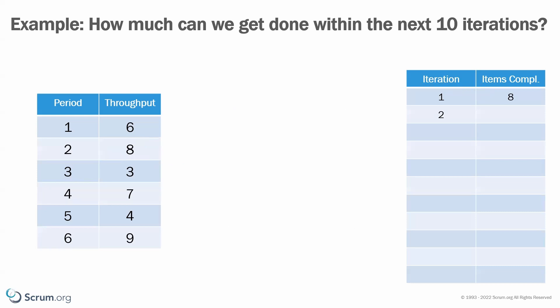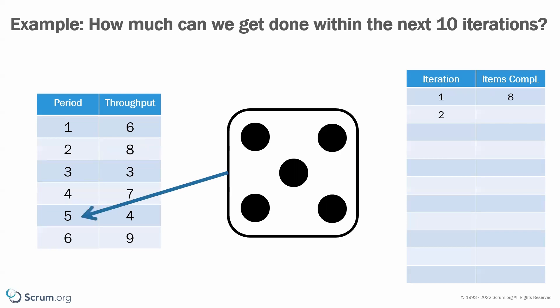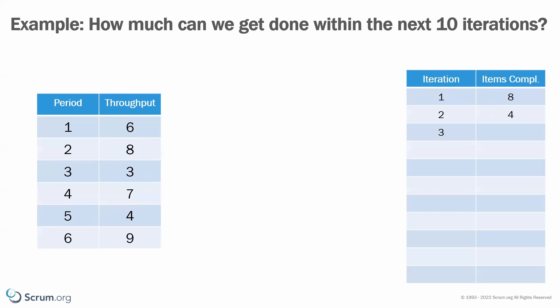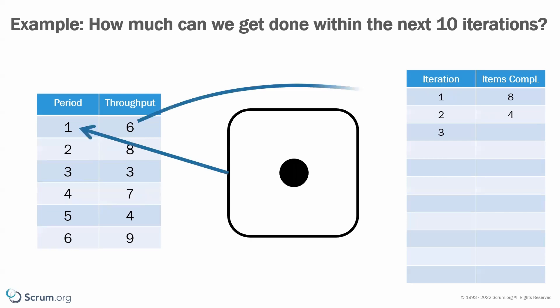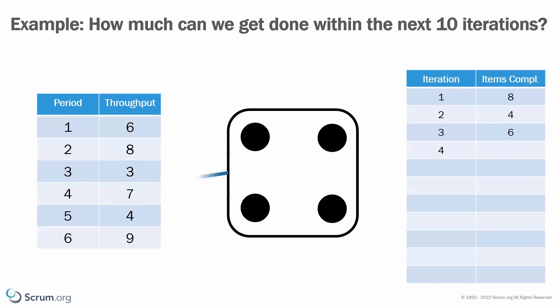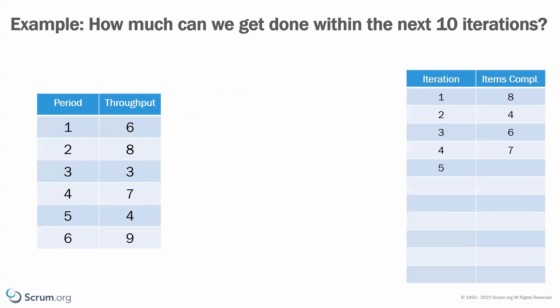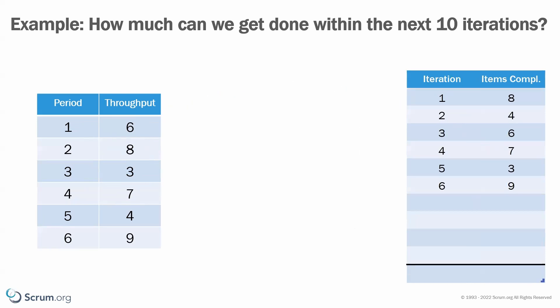Then we repeat this. In the next scenario we roll five, so we go to period number five and draw the throughput of four into the result table. We repeat again — this time it's a one, but we put the six into our result. We have a four, and so on. We do this multiple times, completing all ten iterations we want to forecast. Once we have run this for ten iterations, we summarize the numbers in the table on the right, and in this case the sum for this simulation is 58.